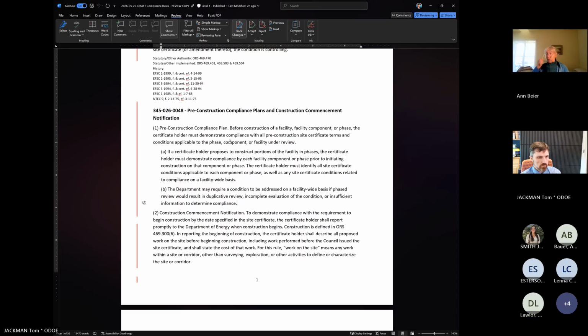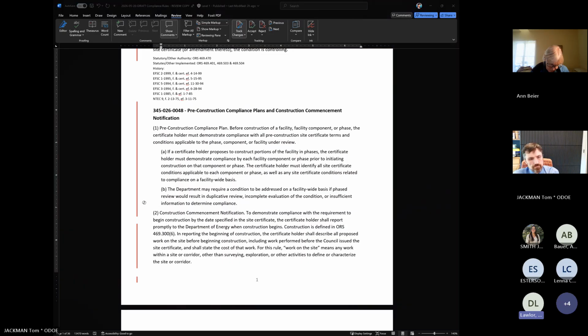The additional piece that we think would be good is, I think you've used the word component. We might go by stage of construction because, for example, we might not even start clearing the battery energy storage site until a year into construction. And so we won't have, for example, final design. We won't have our electrical permits, because electrical permits, and even building permits, have to be done in a certain period of time prior to actually building that component.